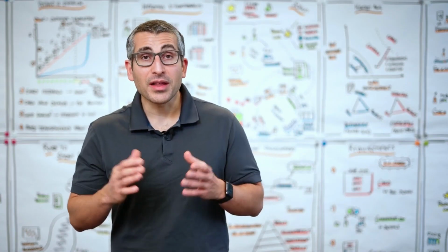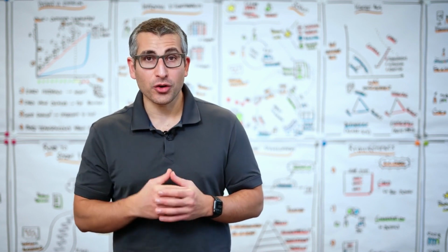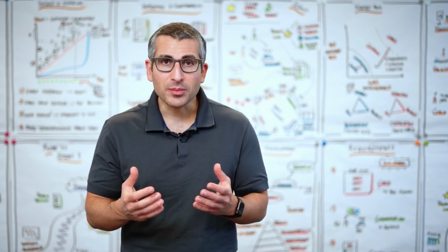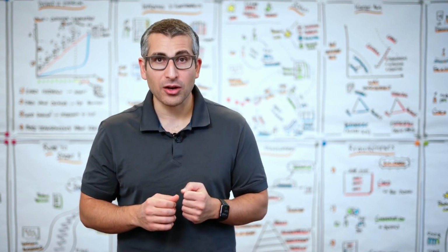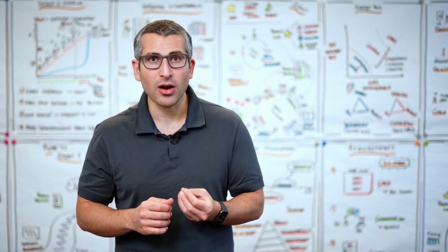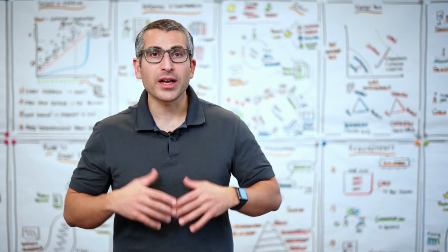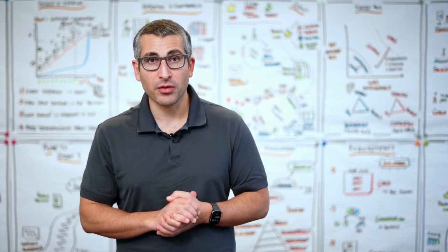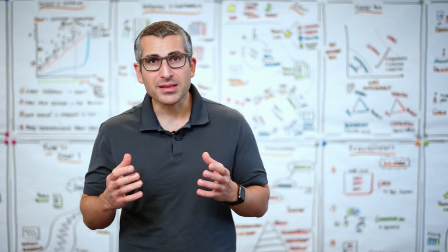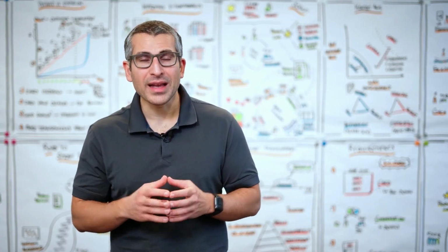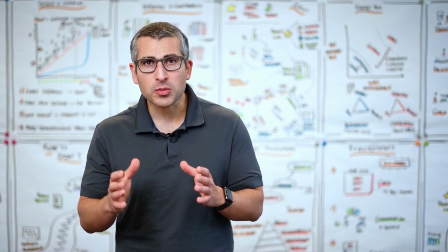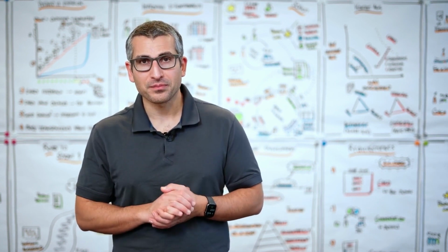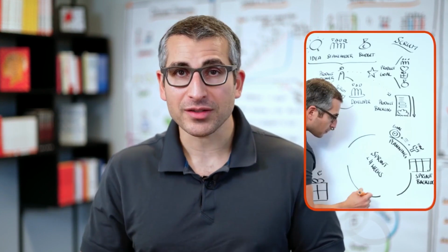Last but not least, the developers talk about how they are going to implement those items. Some teams even break down the product backlog items, which are now in the sprint backlog, into individual tasks to create more transparency around how they want to deliver things. The result of our sprint planning meeting is the sprint backlog, our second artifact in Scrum. In most cases, this artifact or the sprint backlog is structured like a Kanban board. We will explore this in more detail later. After sprint planning, with our sprint backlog right next to us, the team moves into execution.